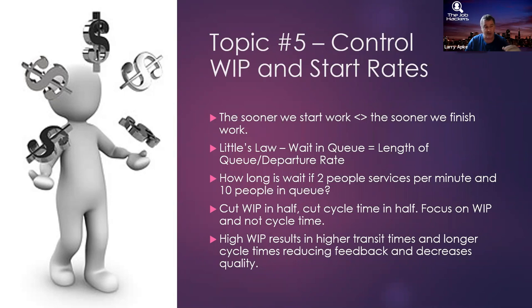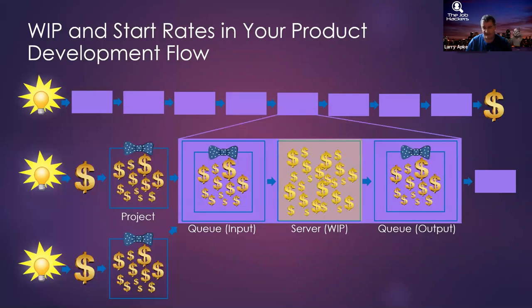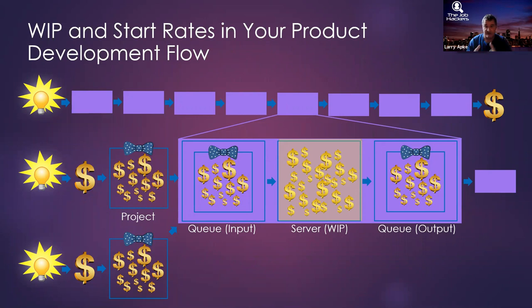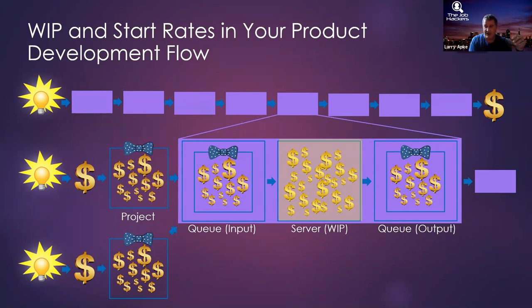Higher WIP rates result in higher transit times and longer cycle times, which decreases feedback and decreases quality, and incurs a high opportunity cost because you're not delivering what you could be. In most waterfall projects, teams are working on a little bit of everything — 10% of this, get stuck, start 10% of something else — until they've got almost everything in their backlog at some various state of progress, but none of it finished.